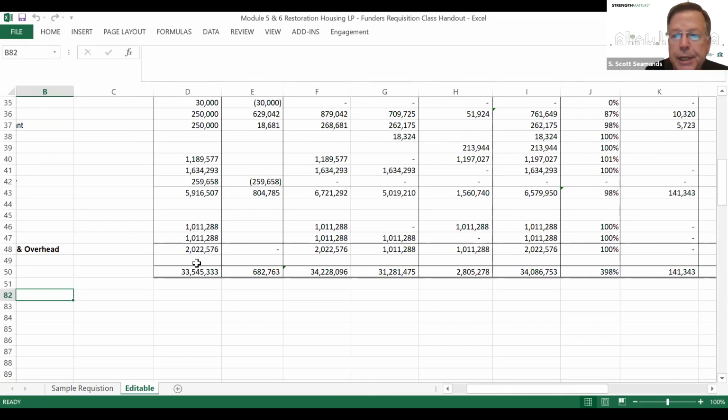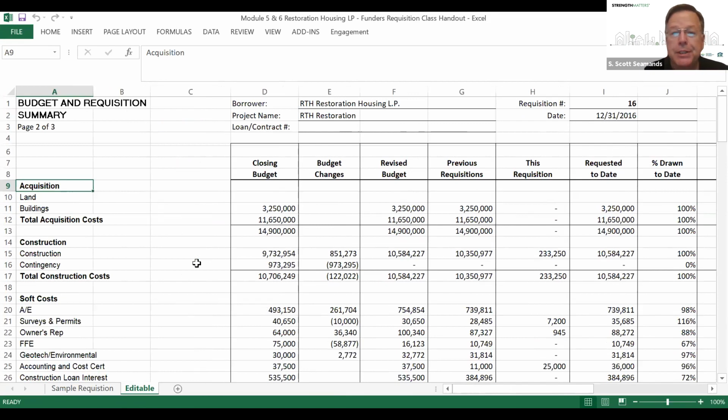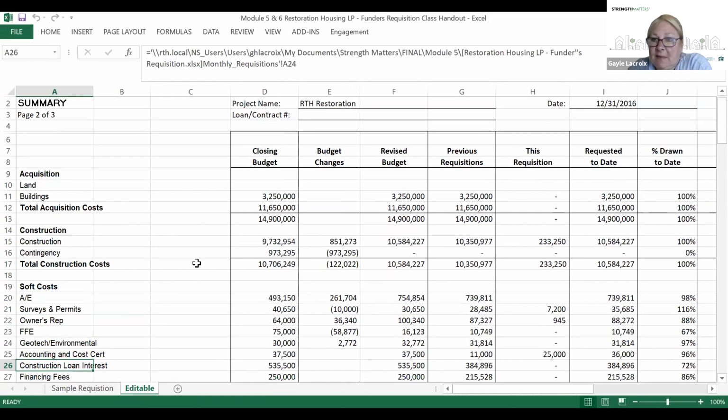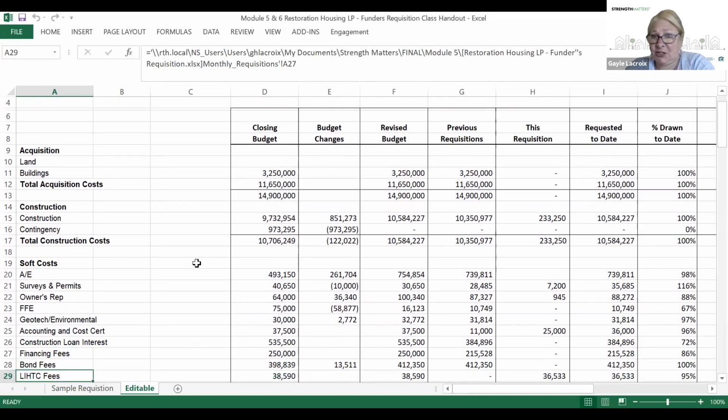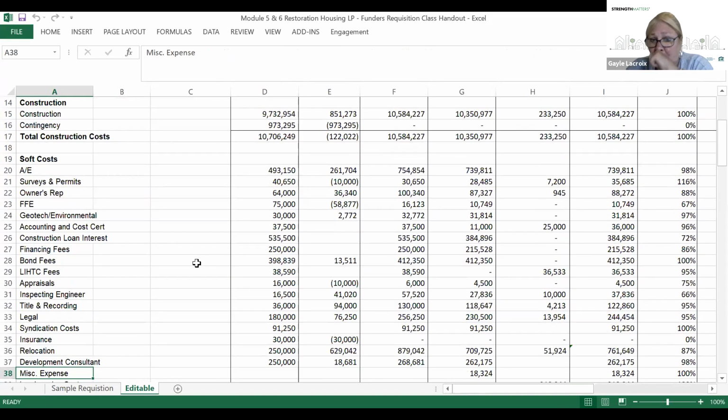So I see that 2,805,000. This requisition ties to, in that sources tab section, these uses in column H up here, which is showing us what the 2,805,000 is going to be used for. Right. So it needs to balance. Your sources need to match your uses every single time. You want to check each column to make sure each column balances. Sometimes we'll have an issue with the previous requisition. We had to reissue it. Make sure you're using the final requisition from the prior period, not the interim, otherwise you'll have an issue.